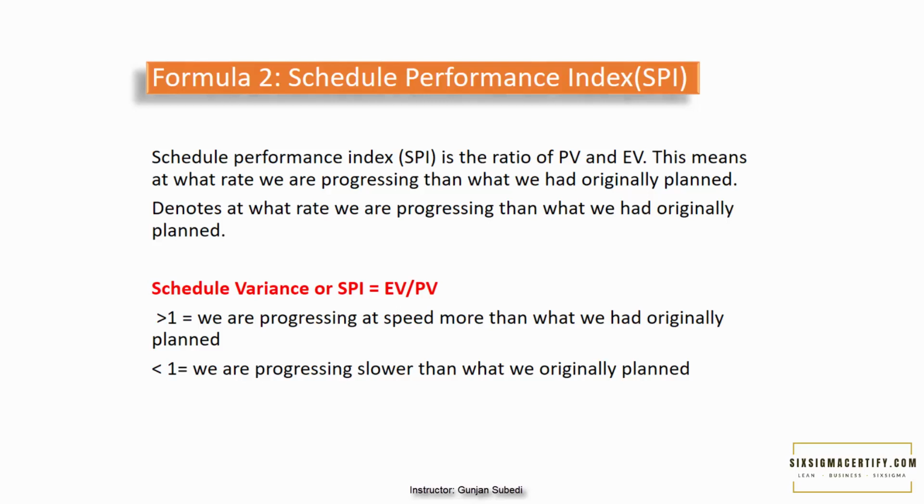And less than 1 means we are progressing slower than what we originally planned, and it may bring us into problems, as we may not complete the project in due time or may have to add additional resources or people to complete the project in due time.